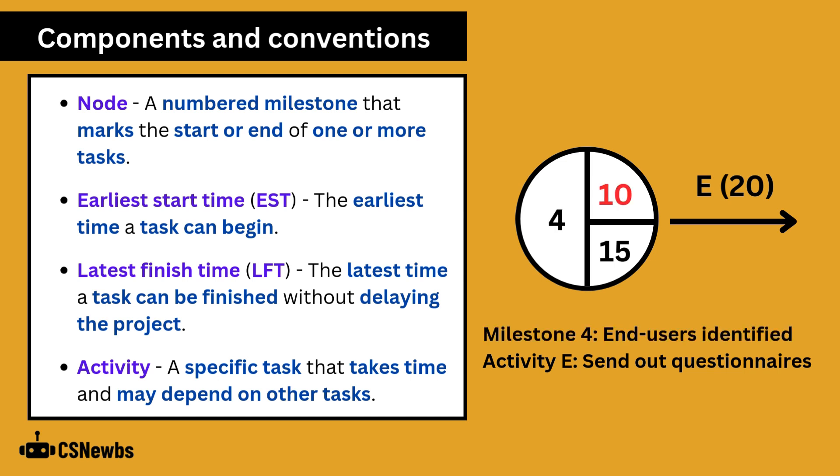Within the node is the earliest start time, which is the earliest time that a task can begin, and the latest finish time, which is the latest time that a task can be finished without delaying the project.